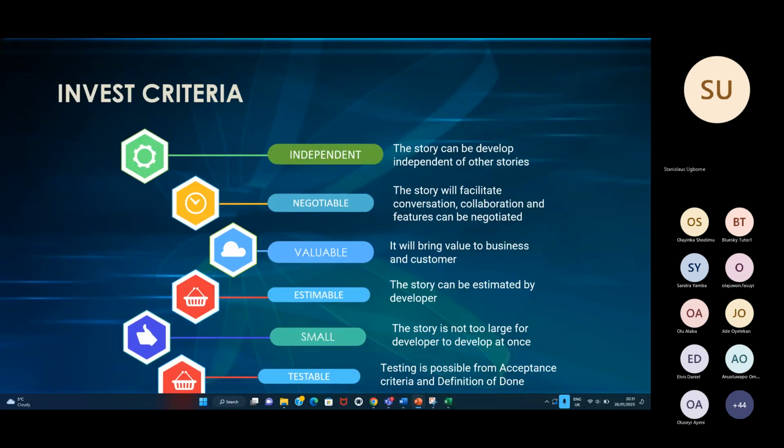So definition of done, because I had somebody ask that question during one of the training. The definition of done means that the team has to come together to write their definition of done. What do we need when we say we are starting a sprint to be able to complete this sprint, what are the things that need to be completed? You can say, okay, the user story has to be written. So the BA needs to be sure that they've written the user stories.